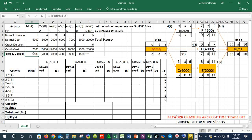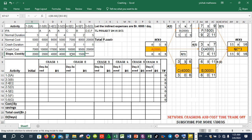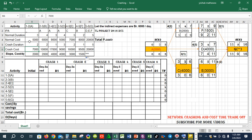The slope is equal to crash cost minus normal cost, over normal duration minus crash duration. That means crash cost minus normal cost over normal duration minus crash duration.